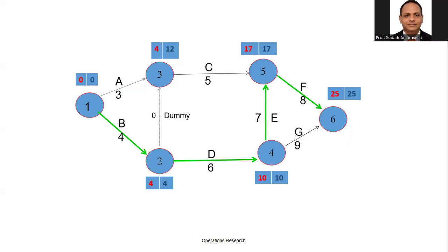In between any activity, you can see events. Those represent the earliest start time i value, earliest start time j value, latest completion time i value, latest completion time j value. According to activity A, 12 is the latest completion time j value. The starting event, you can remember as the i value. The finishing event, we call the j value.